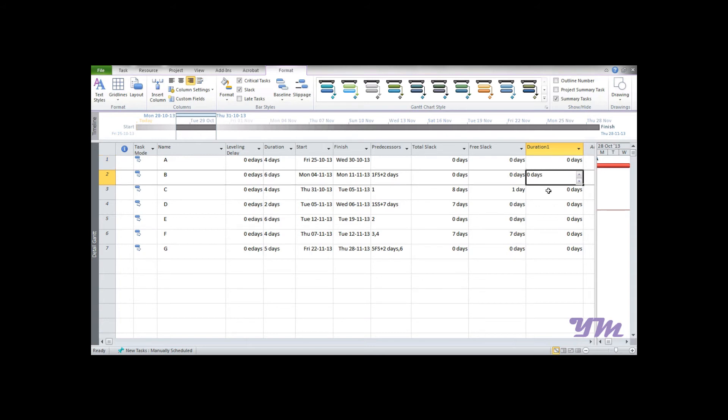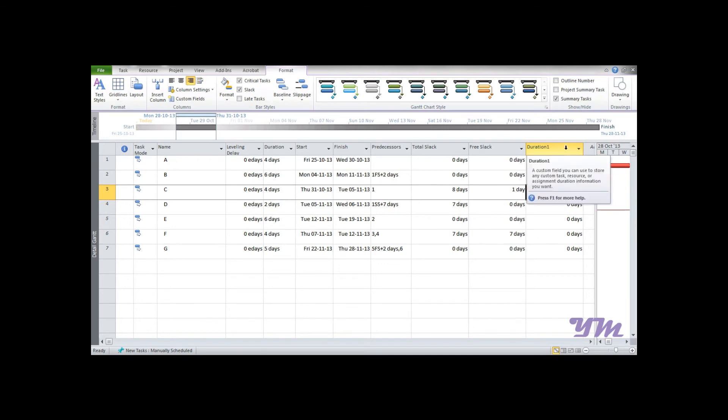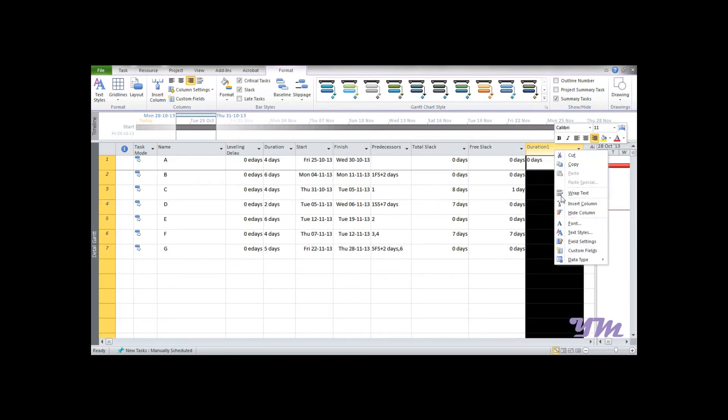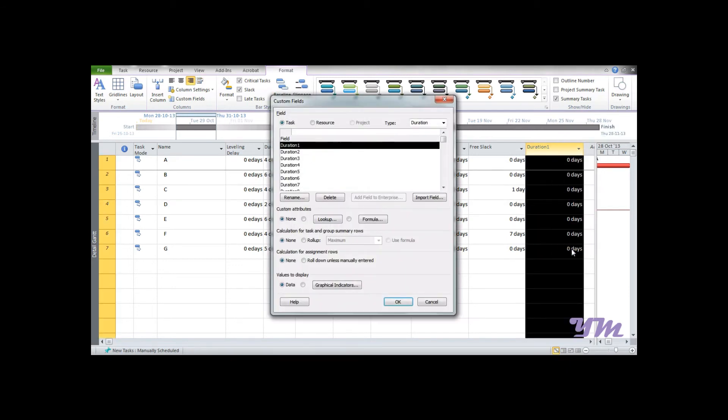Now we got a column which has all the values zero, and we need to enter the value. You could subtract 8 minus 1, which is 7, and type it over here, but that's donkey labor work. We're not going to do that. Just right-click and go to Customize Field. The first thing we're going to do is change the name from Duration 1 to Interfering Slack.